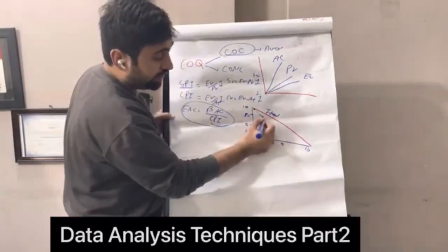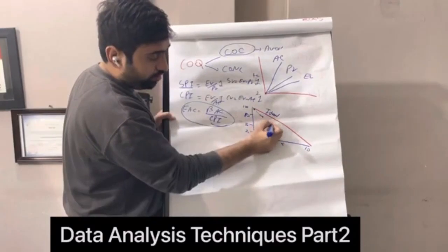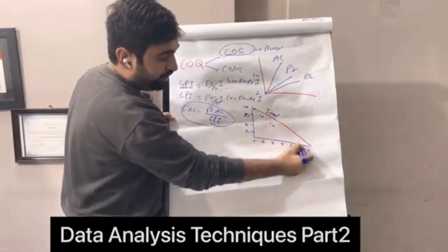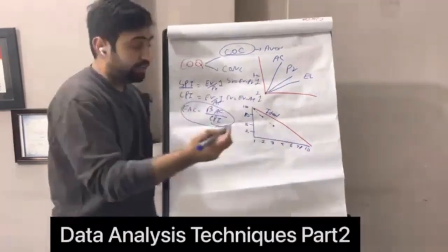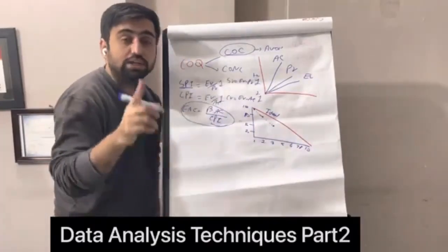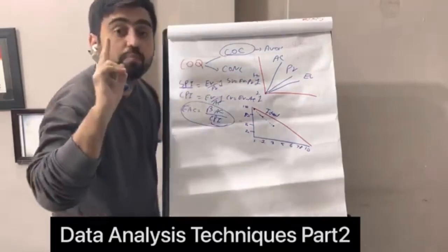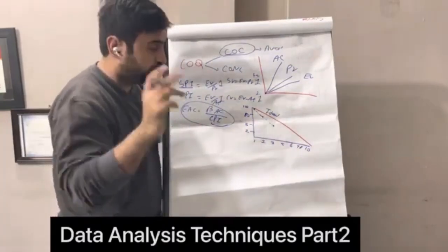Why? If I extrapolate it, let's say on day 3 you also moved here, I will be able to complete the work earlier than planned. So if the burn down chart is on the downside, the variance is positive.